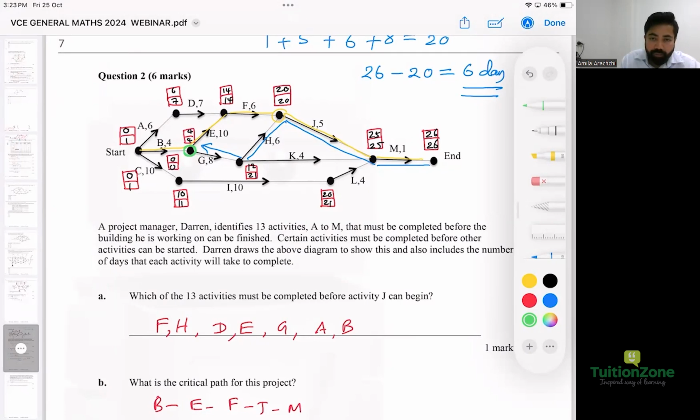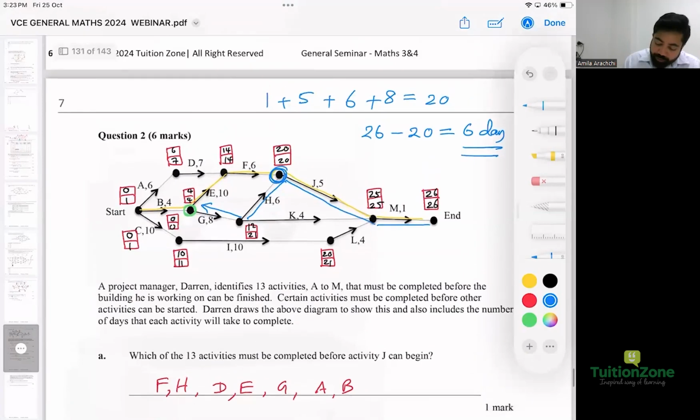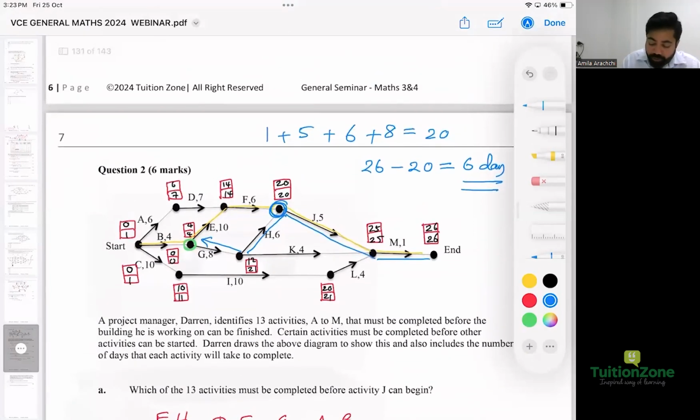I think the best way we can check is just check the value at this particular point first. Again, how do you get that point? 14 plus 6, I'll write somewhere there. 14 plus 6 is 20. And also the other branch, we get 12 plus 6, which is 18. So at this stage, it looks like you can reduce the B by 2 in a way.